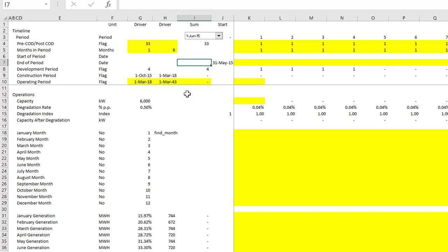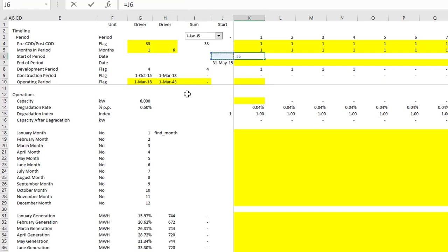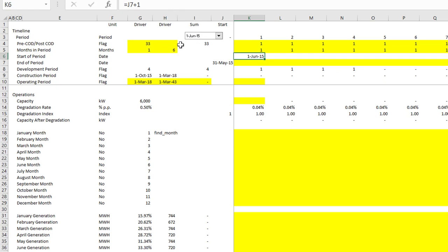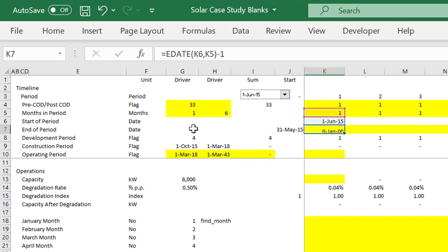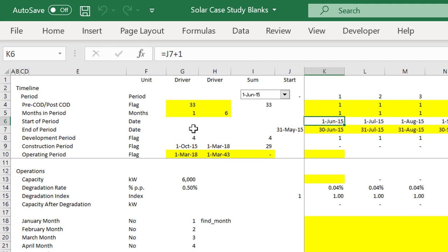When you have a start and an end, you begin with the end, then the start is the next period - plus one. That's our first start period. Then for months in the period, put an EDATE, take the start of the period, and go to how many months you want, but put minus one to keep them all together.